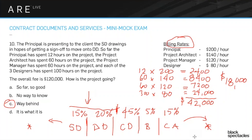Here's a practical example: if at the SD presentation the client says 'it's not working, I'm letting you go,' you'd bill them $42,000 — what you've actually spent. But the client would say SD is only 15% of the fee and write you a check for $18,000. That gap illustrates the direct relationship between project management and how the financial and contractual relationships work.